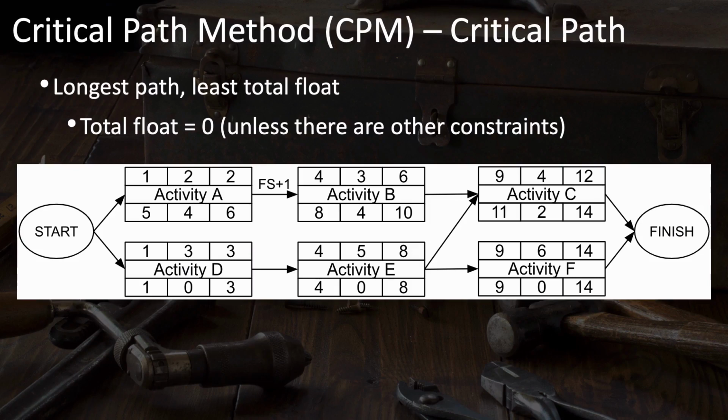As you take a look at these 3 different paths, we're interested in finding out which is the critical path, that path that will determine how long the project is, that path that determines the minimum duration of the project. As you look at these paths, you can see that the path A, B, and C has some slack or float in it, as we've figured out. So there's some leeway there. So that's not the critical path. And neither is D, E, and C, because again, you've got some gap between E and C. And so C can slide a little bit.